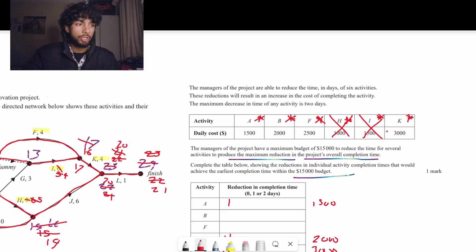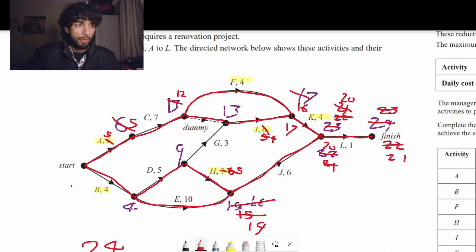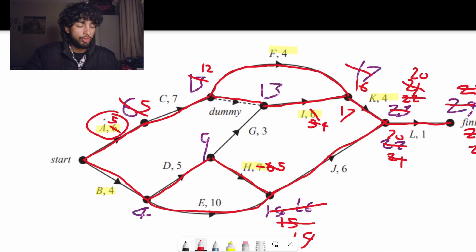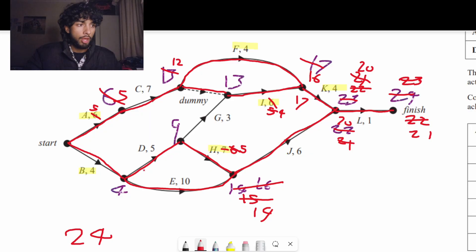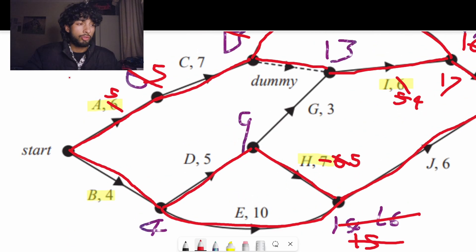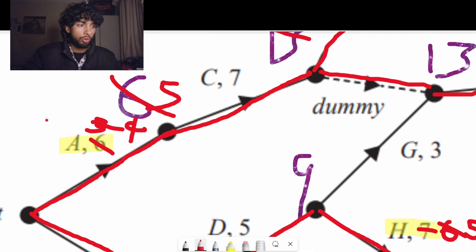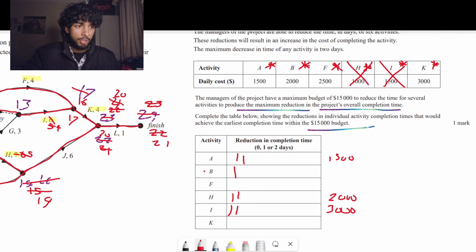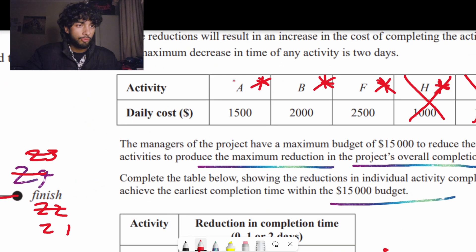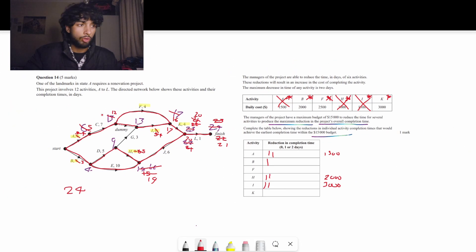Let's have a quick check of our budget. See if we're going over the budget. So this is 1,500. And h is 2,000 because we have two of them. And i is 3,000. So that is clearly under the budget. So we're going to do some more reductions. We can't use h. So what is the cheapest way? We can reduce a again one more time. And since h cannot be reduced, the only other thing on that pathway is b.